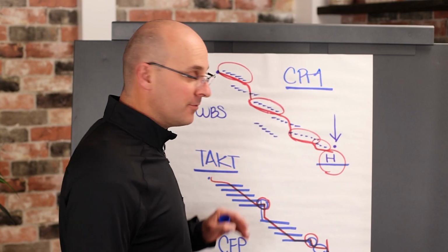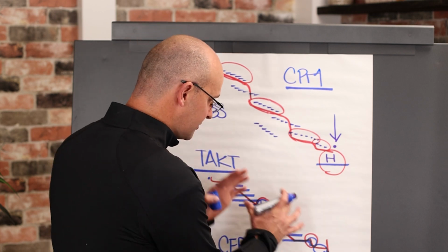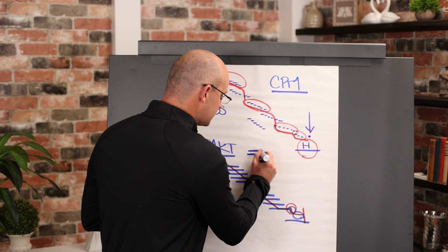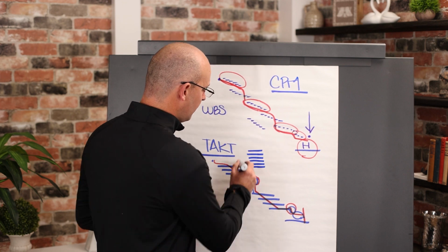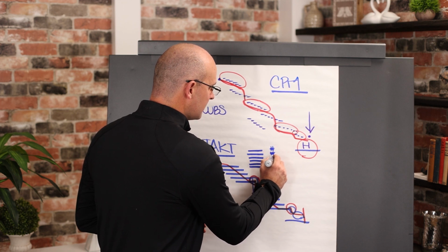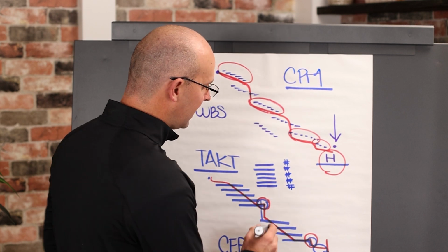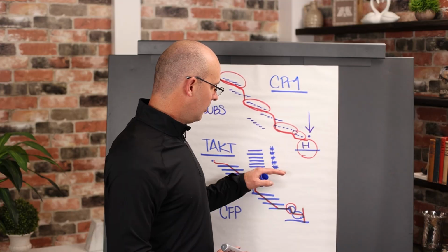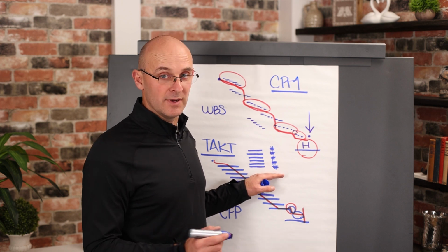If you have this format here, you'll want to do a risk analysis, which means that with your team, you say, here's our phase, write down all the things that could go wrong, and you say, okay, if that went wrong, how many days would that put us behind schedule? Okay? And then you go through and you do an analysis, and I'm not talking about acts of God here. I'm not talking like, okay, the United States got attacked, God forbid, by nuclear missiles.